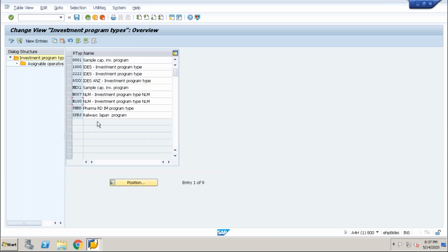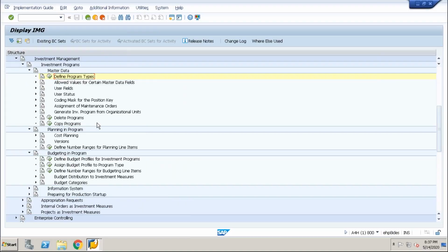I have a doubt in that cost element planning. What are we putting, the budget figures, or is there no cost element? There is no cost element planning here in IM. We will do the cost planning in PS. Oh, okay. But in the controlling area, we saw that plan and actuals, no? That is not the budget figures. It is just planning figures, no? Correct. Okay.